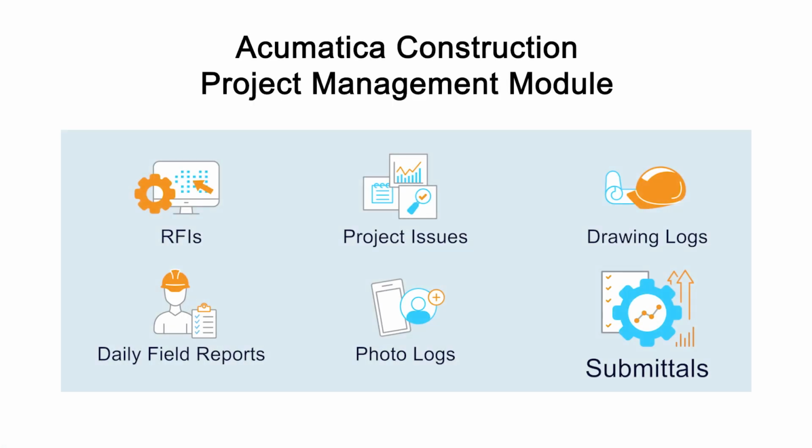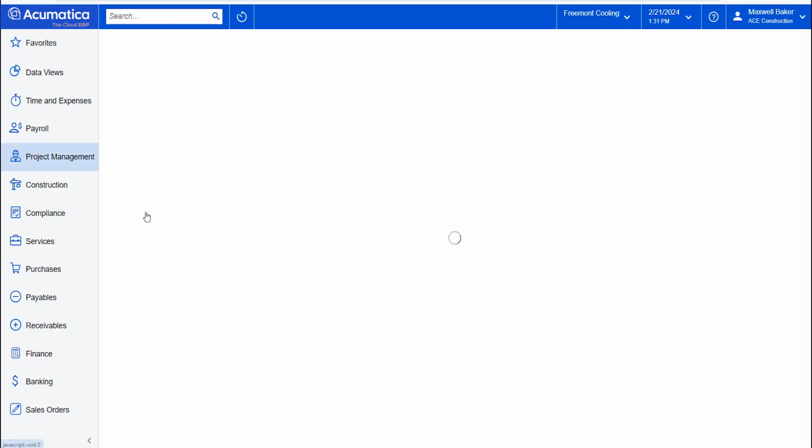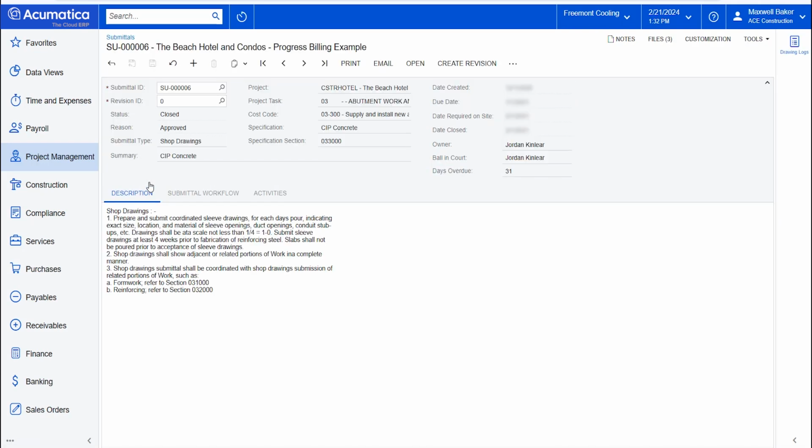A submittal contains proposed changes or details that require approval before implementation on the job site. Submittals must be reviewed and approved before materials are fabricated, purchased, or delivered to the job site. Expedite the entire submittal process. Track and approve submittals inside Acumatica to ensure the work follows approved specifications. Empower managers to review entries, enable submittal workflows, and close them when they are approved and completed.